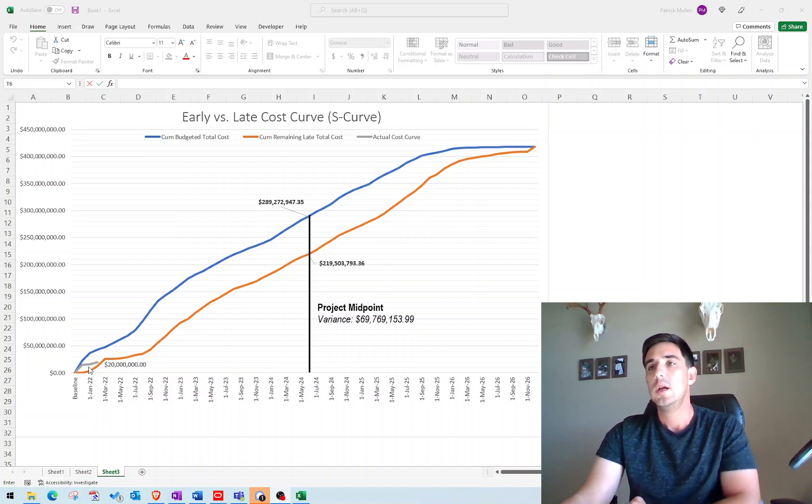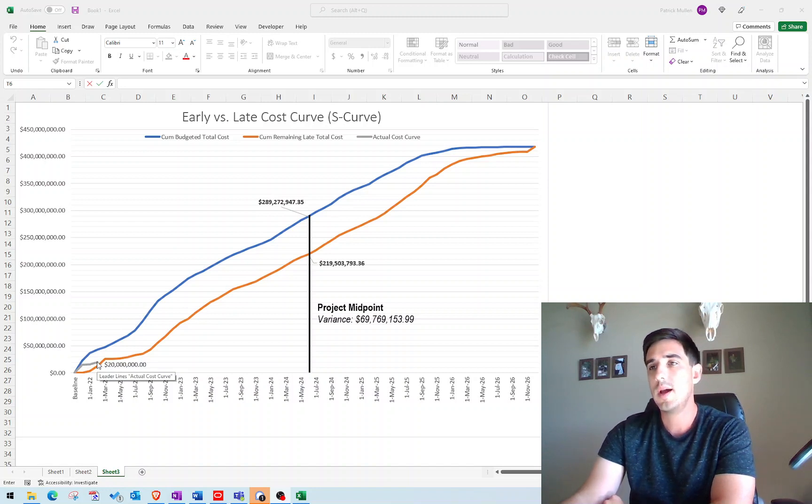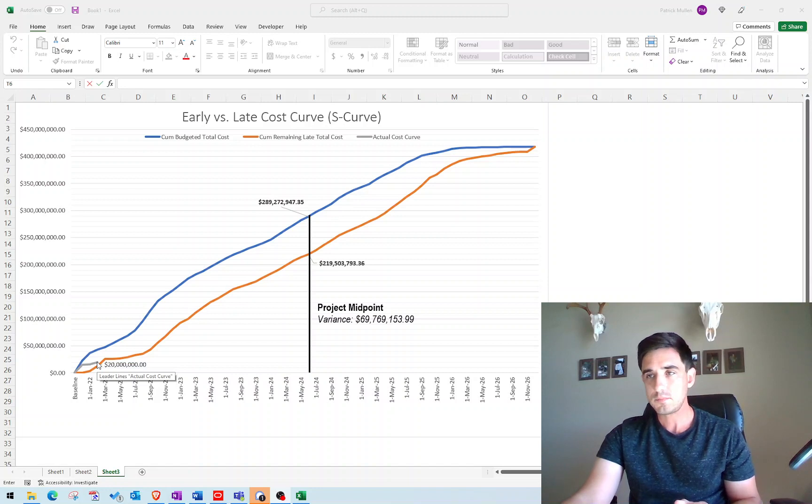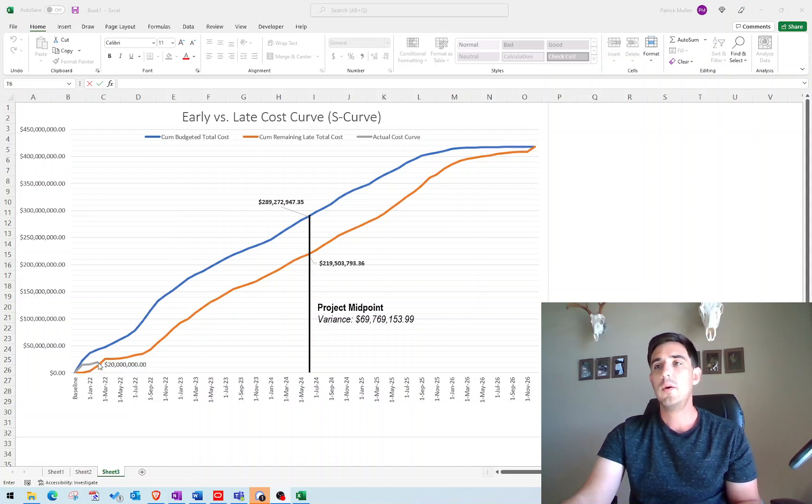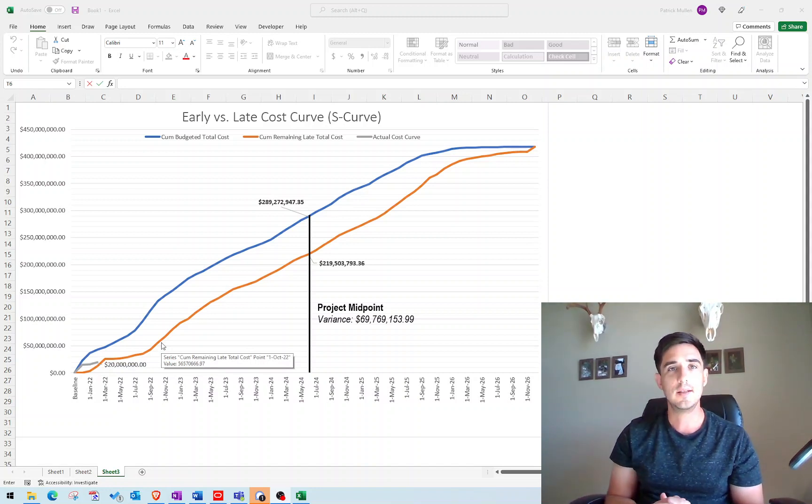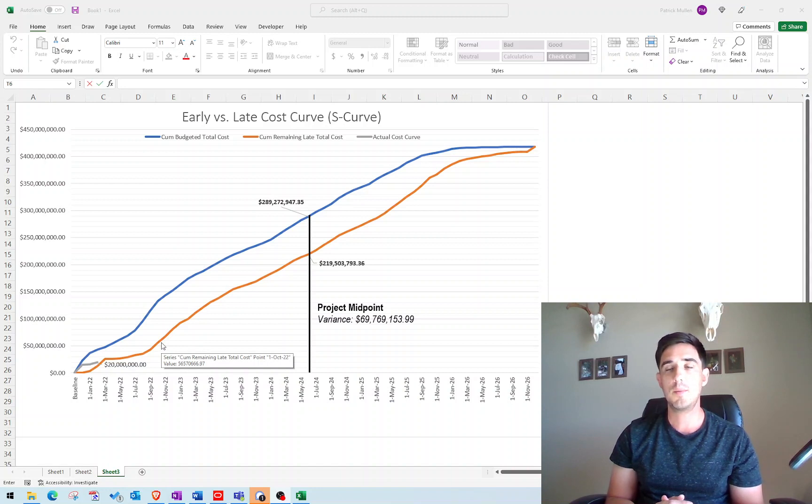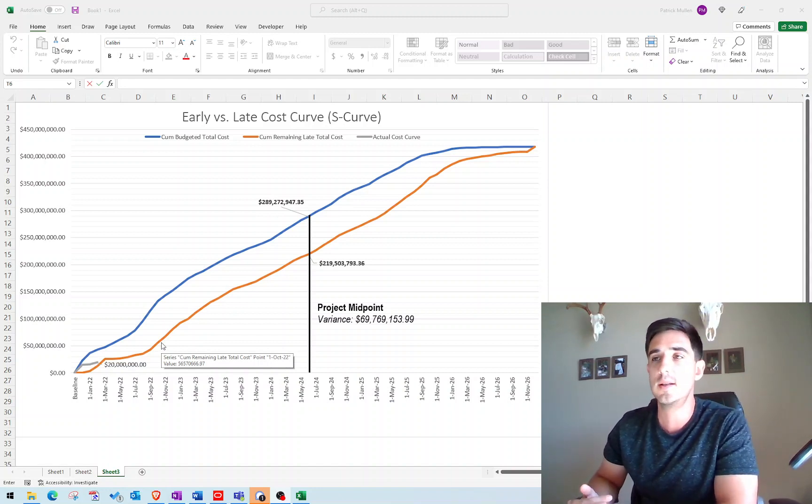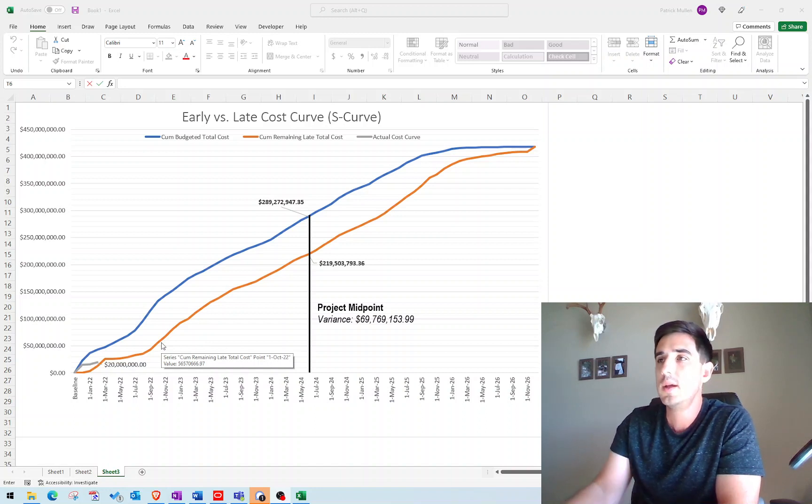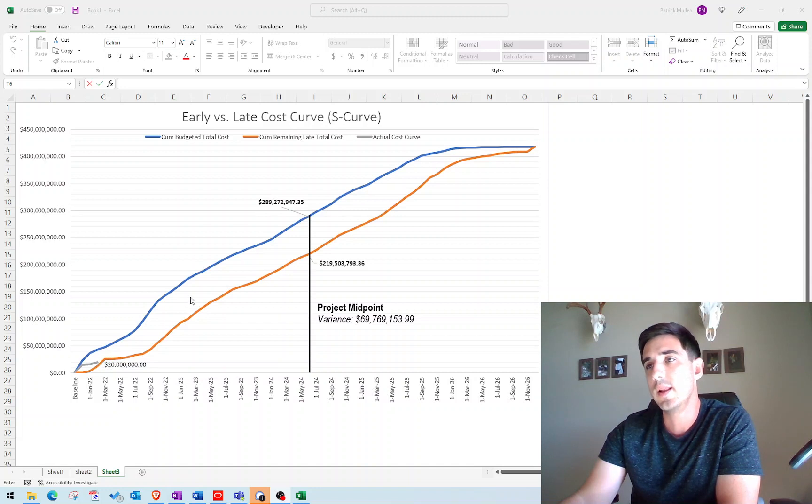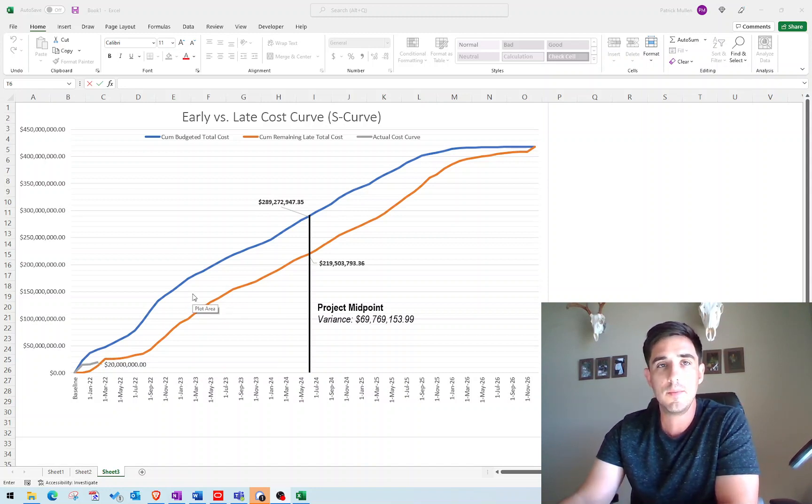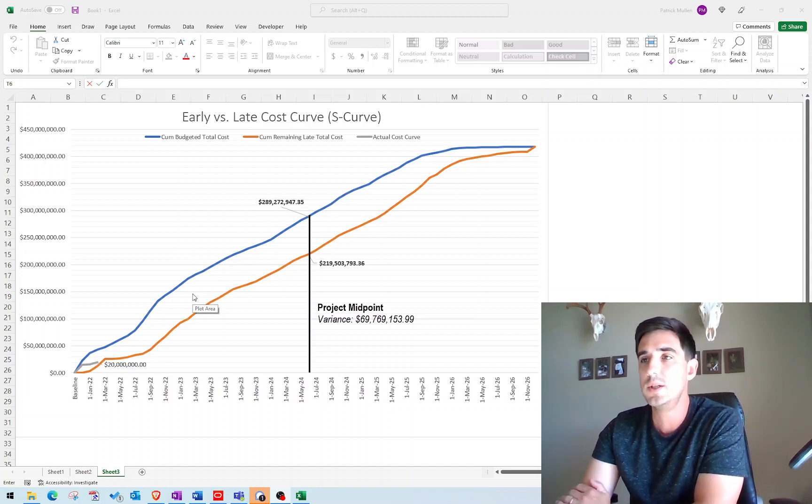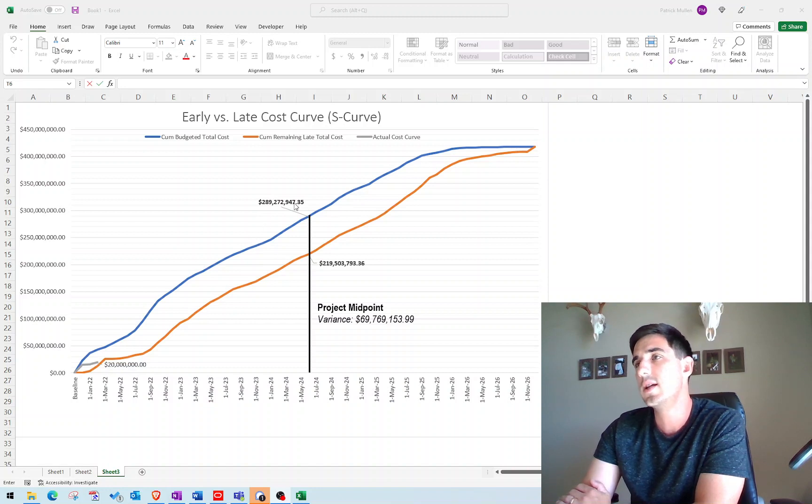So theoretically, what's happening is you're going to track your actual cost throughout the project. Each month, you're going to look at your pay application, and you're going to see how much money has been spent to date. Ideally, that would be above the late curve. And it's not to say it's an exact science that if you're above the late curve, then the project is either on time or early. But it's just one indicator kind of in the bag of tricks that schedulers have of evaluating a project health. If that actual curve is staying above the late curve, then it's indicative that the project is maintaining the completion date.